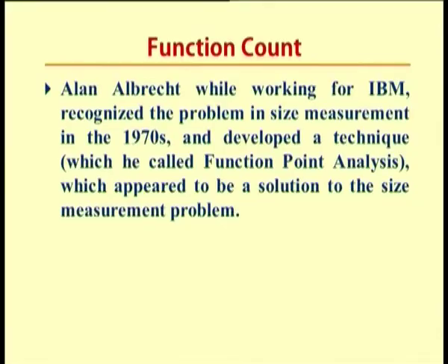So it includes the program header, declaration, so whatever you declare with integer, that is also countable, and the loops and other printf and scanf statements which you write. And non-executable statements, something like comments, are also inclusive of the lines of code count. So this is as per the definition of Conte, but basically given a particular program, we are not supposed to assign the cost based on the total number of lines of code.